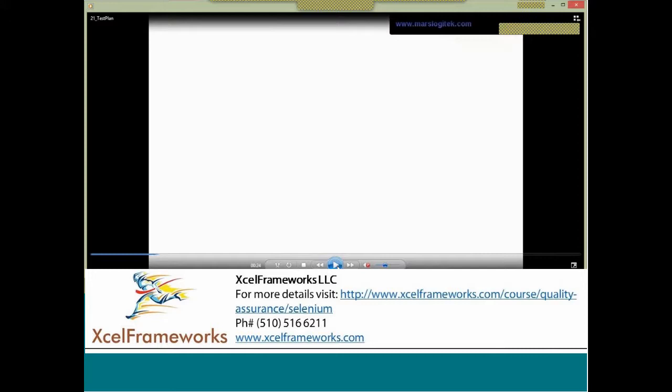Again, we'll call everyone and say what is coming, what the features are. Probably there are 10 different resources. We'll try to understand the system and what test cases are already written or not written, basically understand the features very well. And somebody will say, hey, I can come up with 30 or 40 test cases. It's just an estimation based on experience, based on some methodology. Hey, I can write 30 test cases, 40, 50, I will take 2 hours.